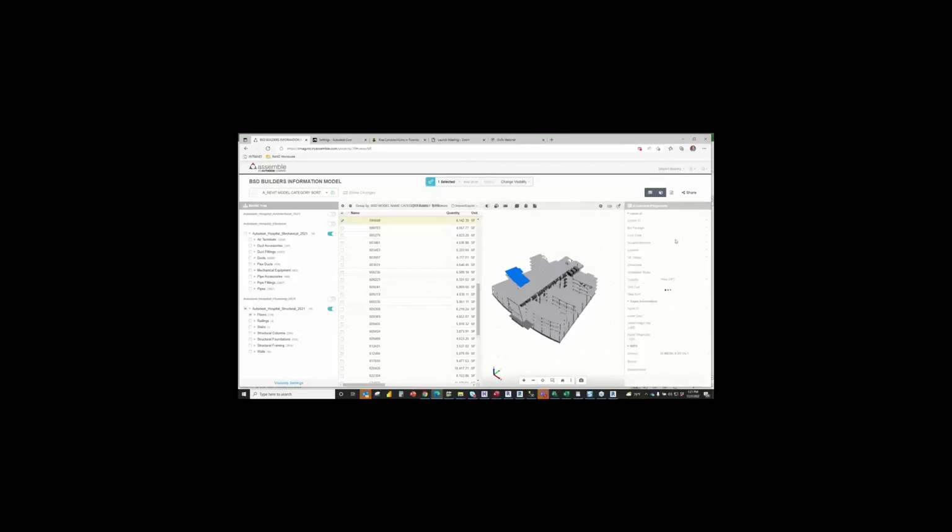And we'll look at the assemble properties again, where this is my construction intelligence. This goes back to the point regarding multiple schedule activities. Well, that slab is a composite that has deck and it has concrete material.